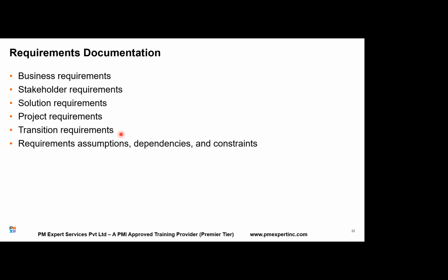Builders often create a separate demo flat. Have you seen, when you go and buy a flat in a township, sometimes the builder creates a temporary sample flat, which is often destroyed once the construction is done? Can I call it a transition requirement? Any kind of temporary requirement.